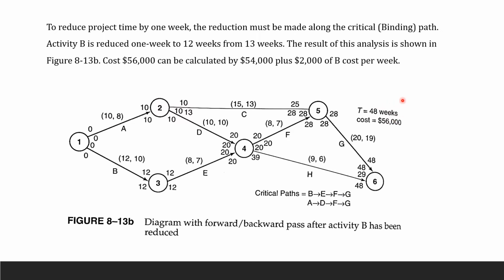That time saving of 1 week with this cost, because this cost, I'm going to highlight this for you, is less than you paying all of your employees in your project for 1 week, okay? And this is how we do it.